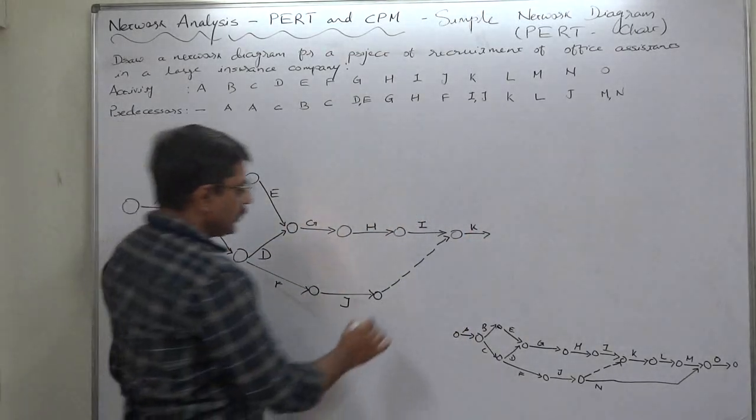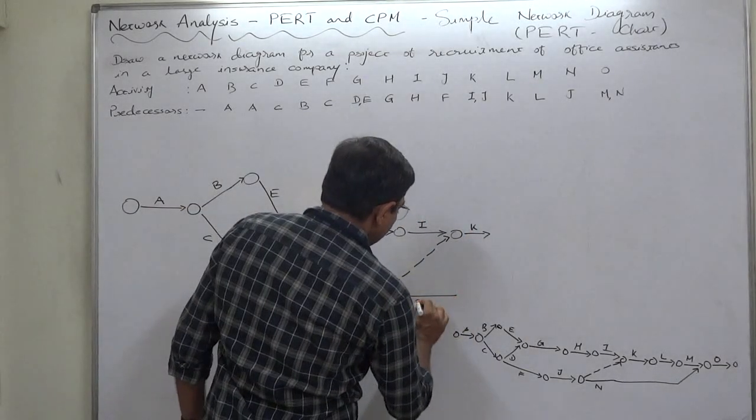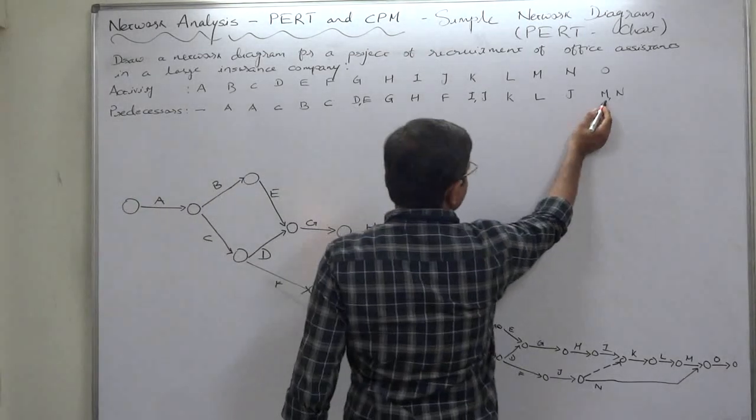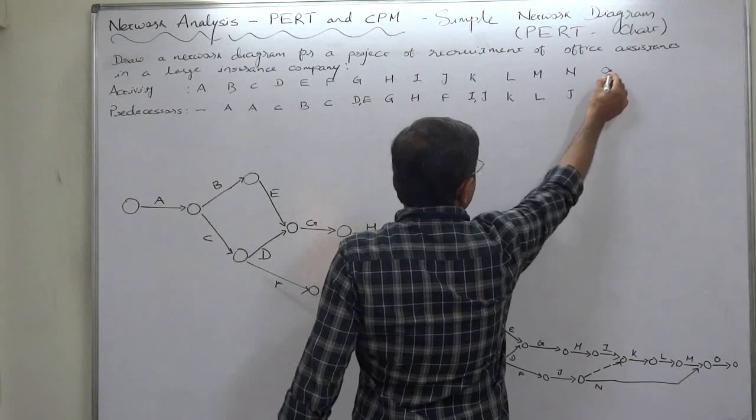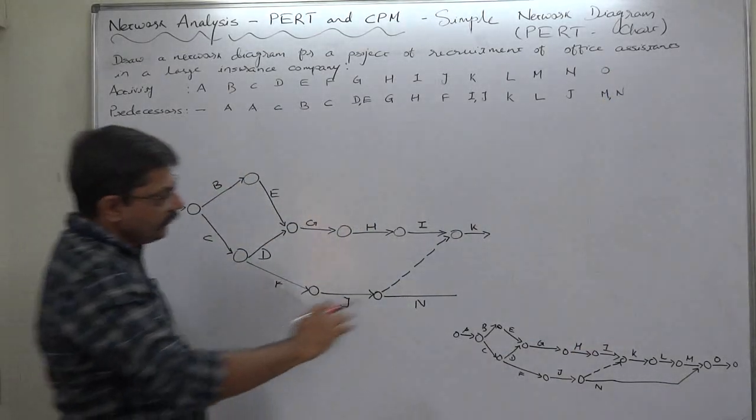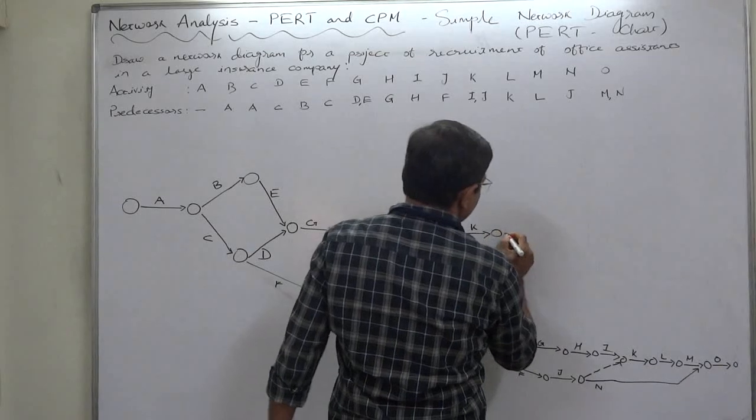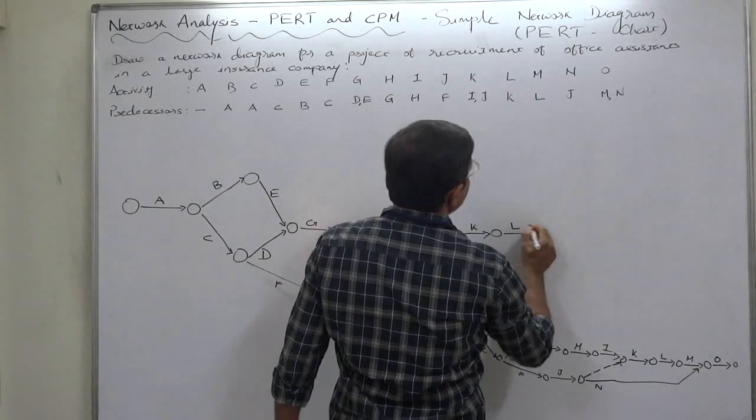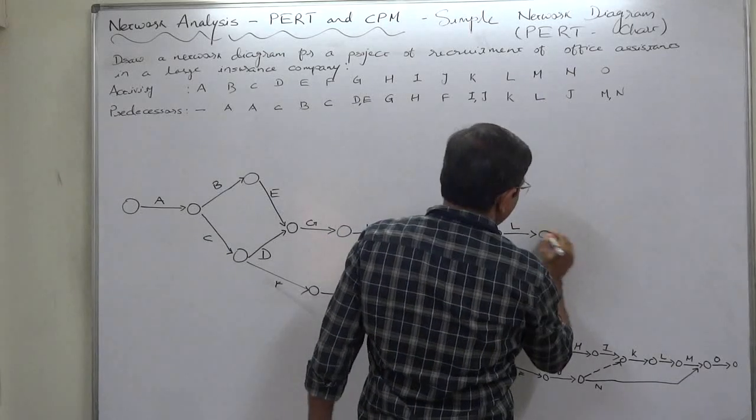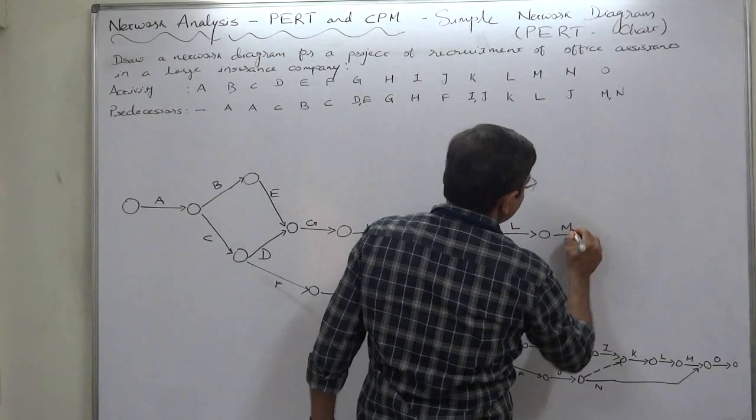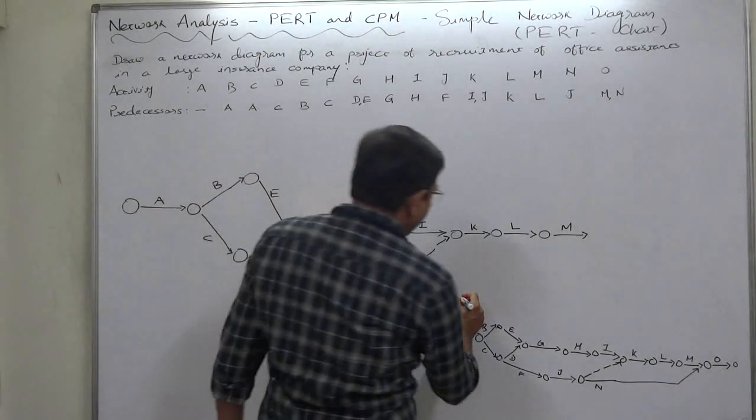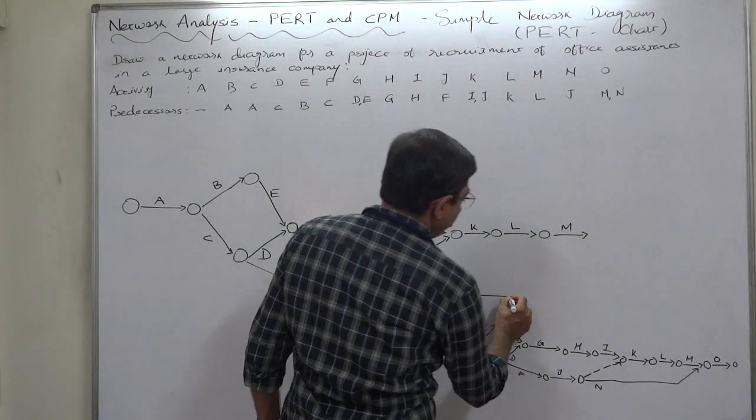Here it will be N, but N becomes the predecessor together with M for the last activity O only. So first we have to go for other activities. K becomes predecessor of L. L becomes predecessor of M. And M and N both become predecessors of O, and O is the last activity.